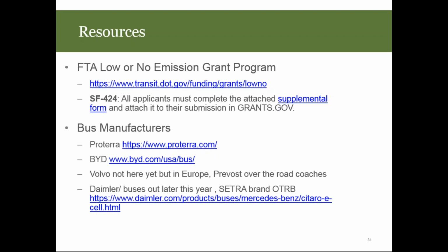They're stuck that way. But then the other thing is that this was the first grant that we had ever just actually partnered with a company, and I think I would have explained that better to our own city legal team, because they were so used to the traditional RFP method that it took us about 2 months to get our contract signed on these buses.